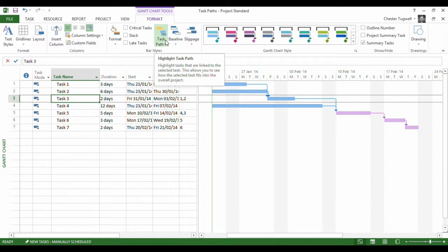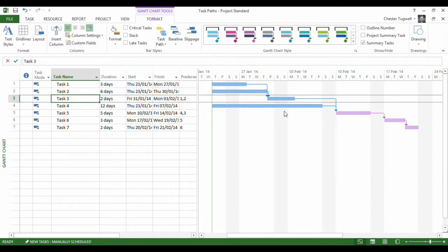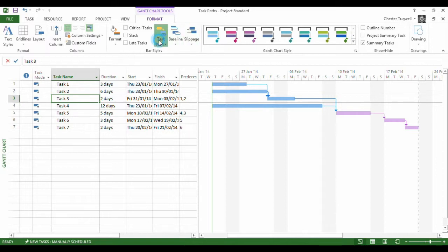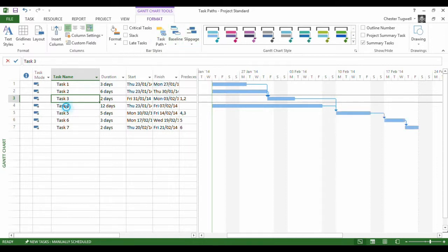So a Driven Successor is the task that's defining the start date of these tasks. And it isn't this task that's doing it. It's in fact this one. This one here is defining when these tasks start. That's because of the extra lag that we have here compared to this task. So let's just see how this works.